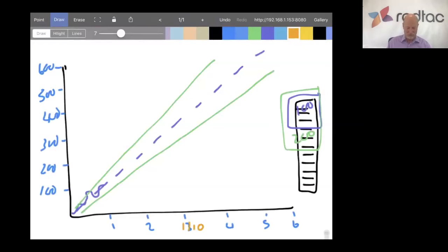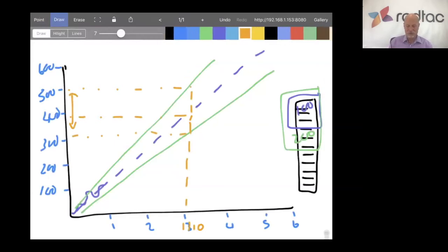So looking at the trend of delivery, it's likely that we'll have around 400 story points on the 1st of October based on factual evidence. The most we're likely to get is 500 story points, and the least we're likely to get is 300 story points. So we've done a probabilistic 3-point estimate there based on the trend of delivery, based on some factual empirical evidence. And that particular question was, what will we get by a certain date? Customers are very typically asked those sorts of questions.